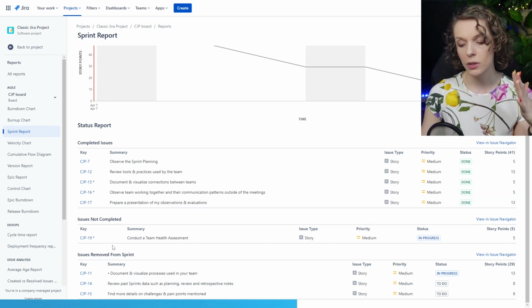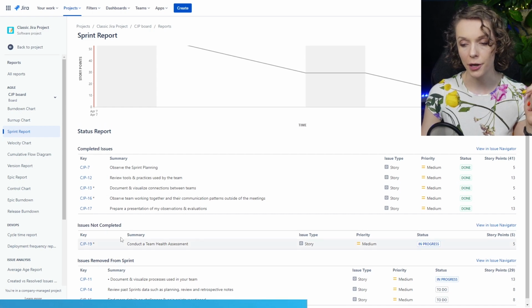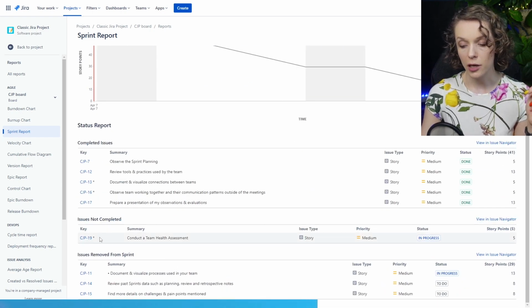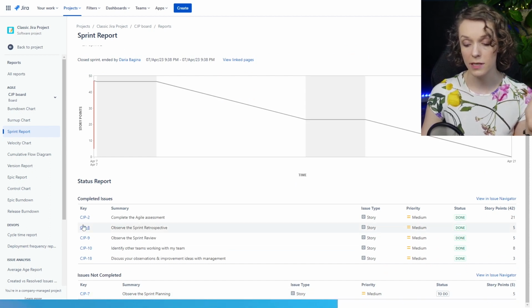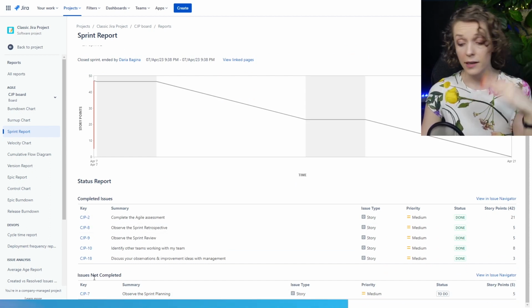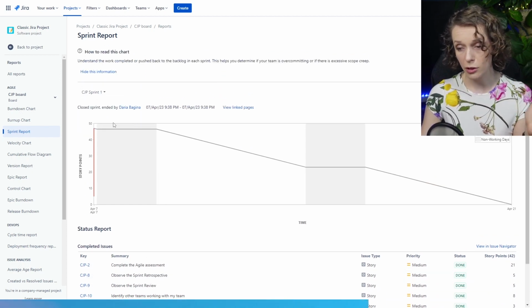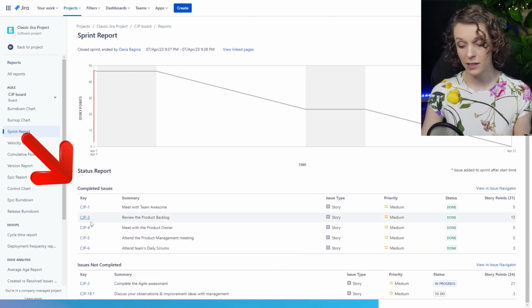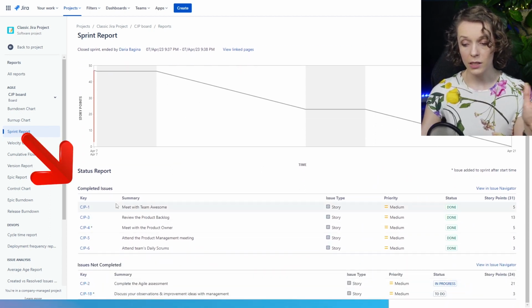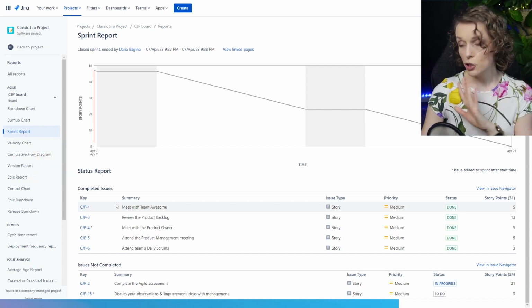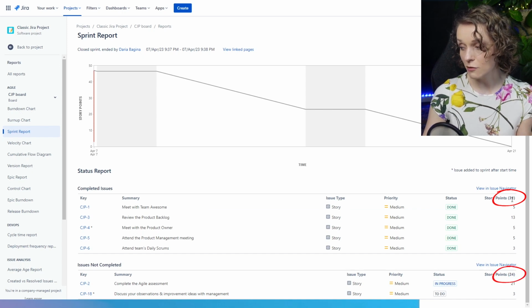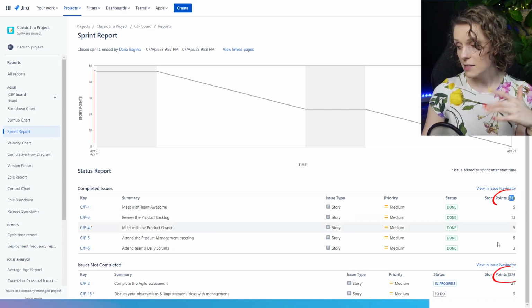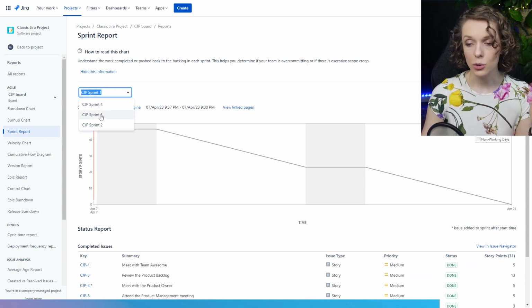You can quickly do kind of a visual analysis of what is going on in the sprint report. If you see issues not completed, if you see a lot of asterisks, that can give you some information. Like here, for example, nothing has been added. You can quickly scan it visually, see that, okay, it seems like sprint 2 has been going good. We didn't add anything. And here we can see a bit of just a general idea of what's going on, just looking at it, right? The first sprint wasn't that good because we have not completed 24 and only completed 31, right? It seems that we really have committed to way too much work.